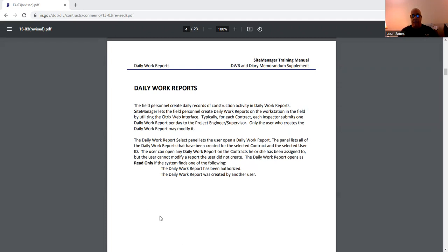Typically, for each contract, each inspector submits one daily work report per day. Notice what I said, one daily work report per day, and that's submitted to the PE or PS. PE is project engineer, PS is project supervisor.